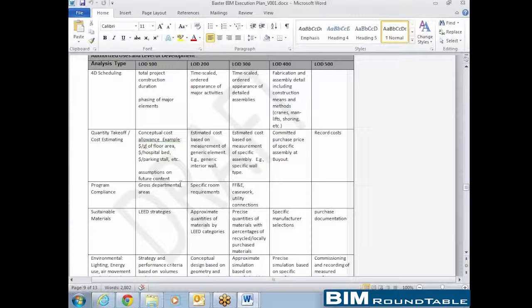A lot better than what apparently it was a few years ago, because I know some people tried it, Chris had mentioned it, when it first came out, and it bombed horribly. Their latest versions that I've been working with are a lot better. There are some issues, especially with steel. Needless to say, we had 779 tons of base plates for steel columns, which is just a little off. And that's a glitch that they had in their system.